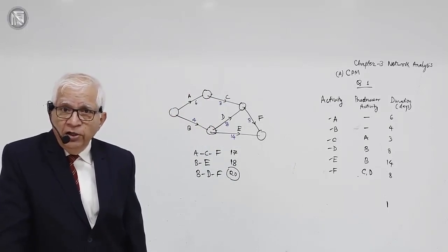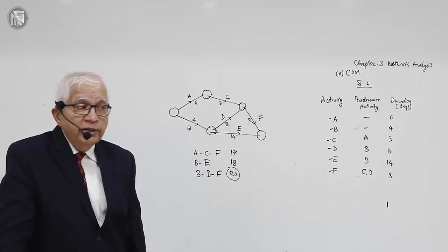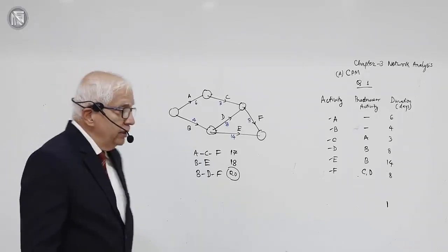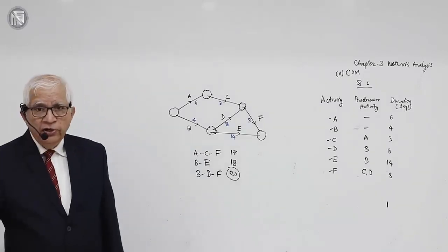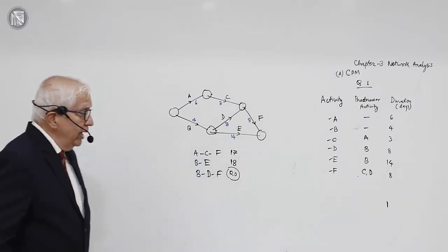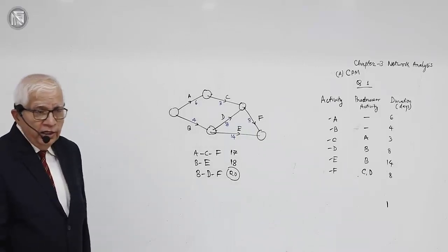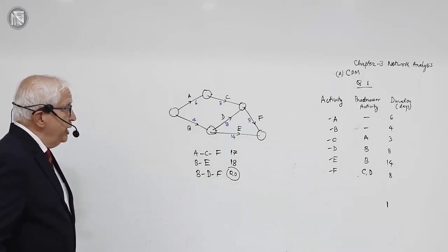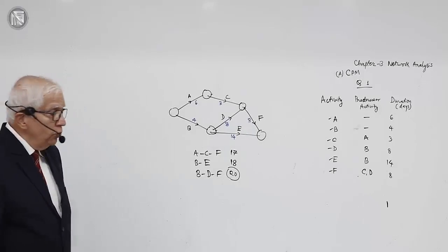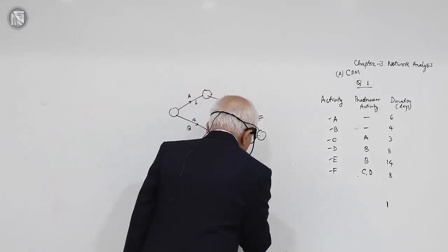Team L, taking the longest time, will decide when the meeting can start at point T. Similarly, here the team taking the longest time is taking 20 days, and the route they are taking is BDF. Therefore BDF being the longest route, this is the duration of the project.